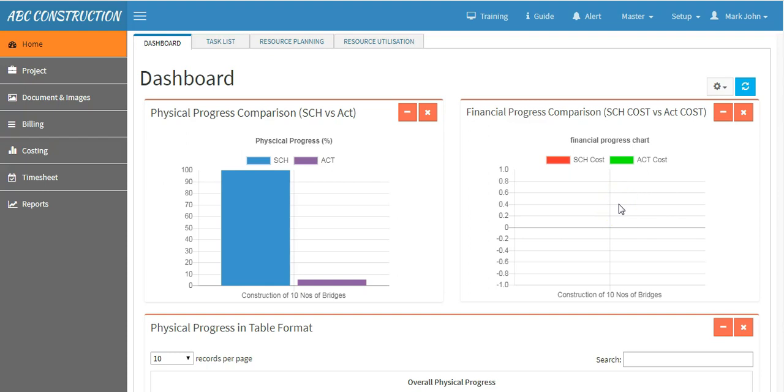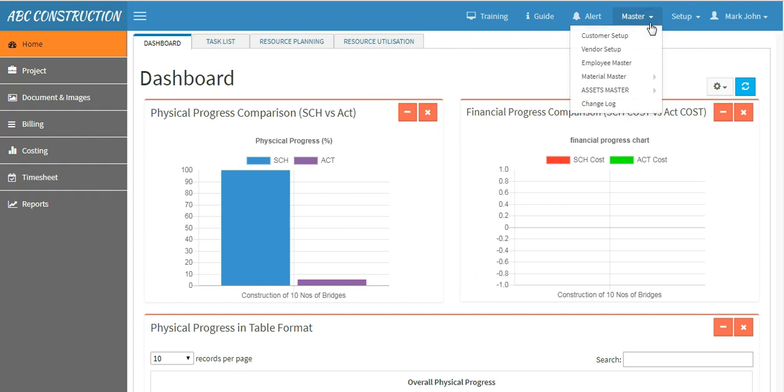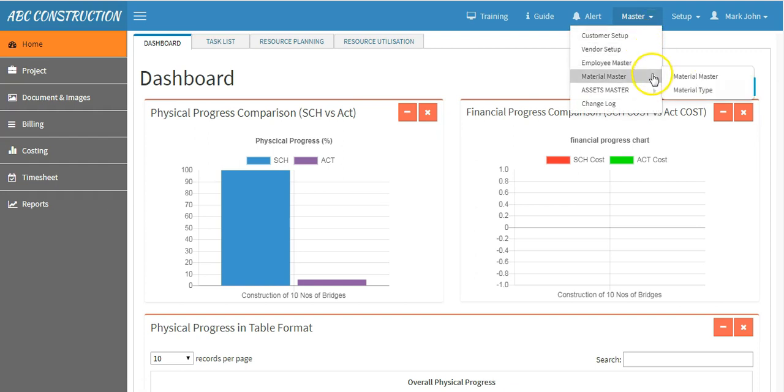To prepare cost estimate, make sure you have created a project and task. Cost estimate will be done at the lowest level of the task in the hierarchy. Also make sure the cost-related masters like employee, material or assets are created.